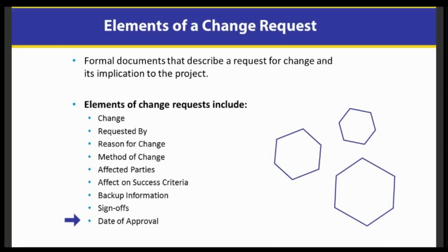If we go through change requests, then it gets approved, and that's the legal way for us to change the triple constraint and get approval that yes, we're willing to wait longer, yes, we're willing to pay more. It's like a contract, and if you're going to change that contract, everybody has to agree and be aware of what they're agreeing to. Okay, all right, that makes sense.